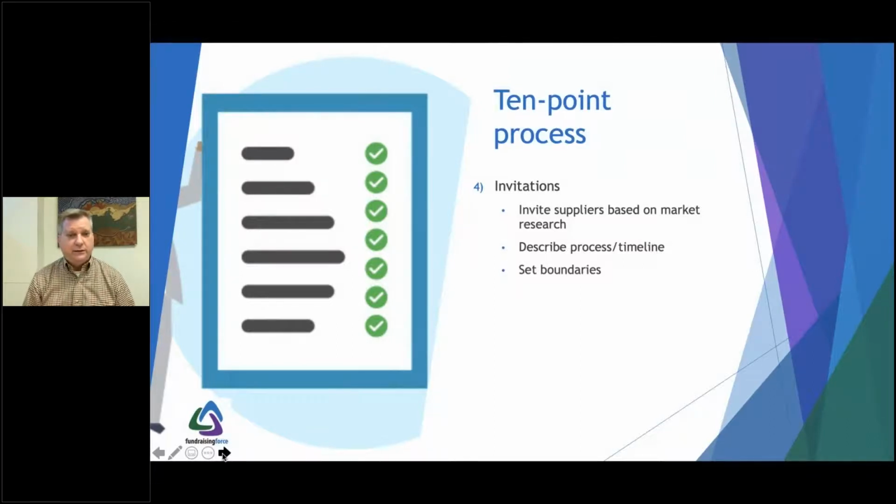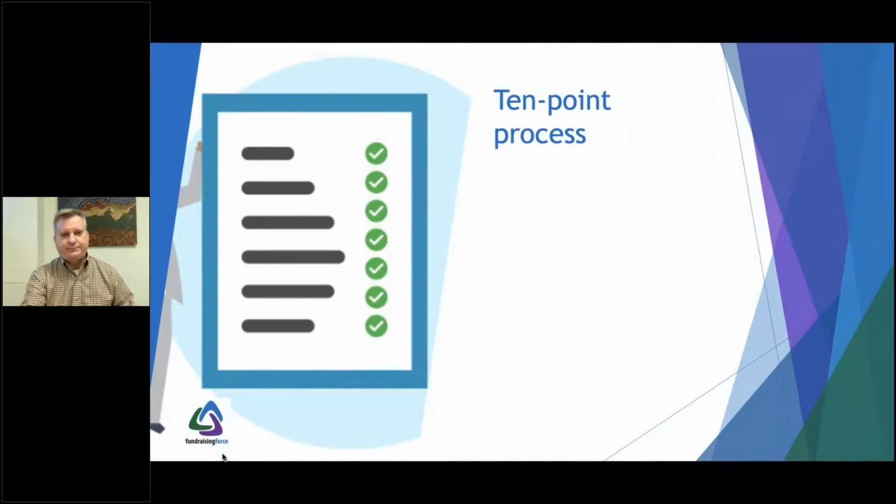You'll also include your non-disclosure agreement, your confidentiality agreement. And when they sign that agreement, they're opting into your process. If they don't return that NDA or that confidentiality agreement, they shouldn't get your RFP packet. So only those that sign that agreement should receive your packet.